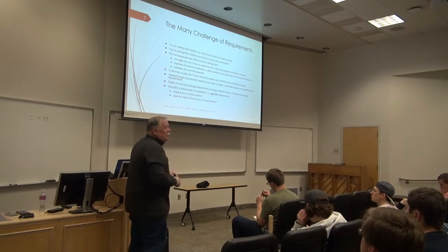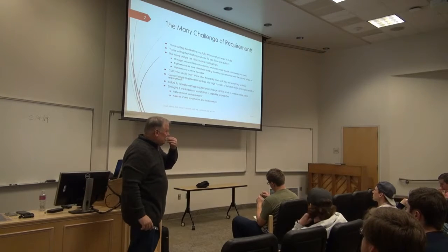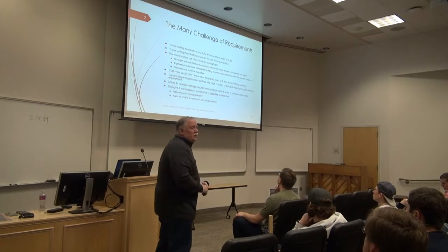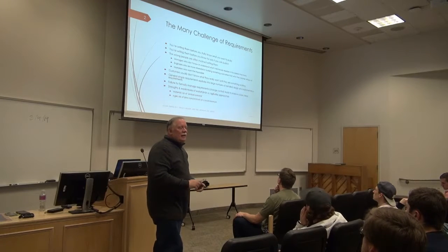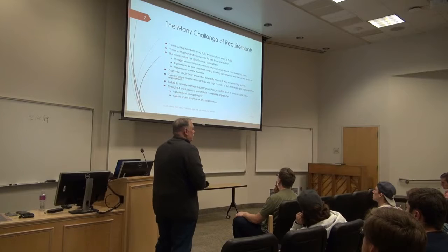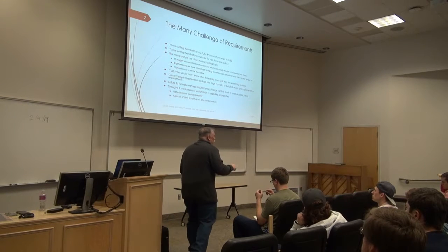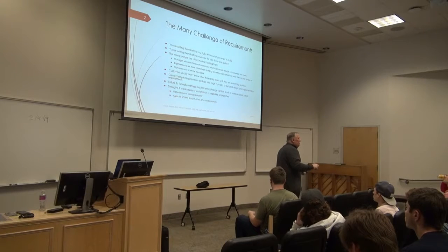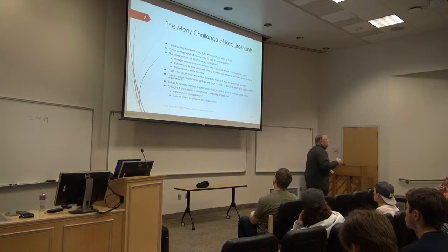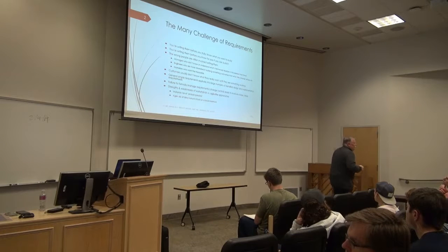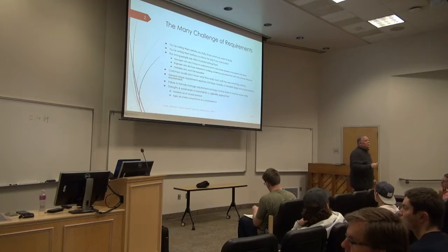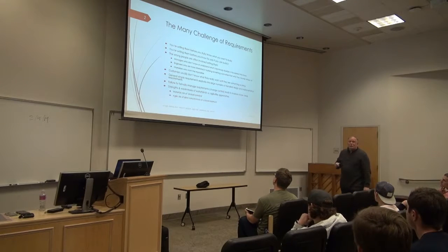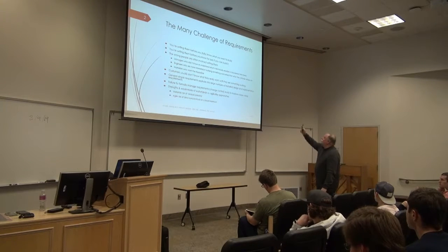Now, back to Armor. You'll hear me quote Armor almost every single class lecture. You write that before you're sure you can build it. And again, the more novel your new project is, that is, the more different it is from anything that you have currently built or that exists and that you fully understand, the more likely it is that there's going to be some unexpected invention in there, which means it's going to seriously impact your schedule and your requirements.